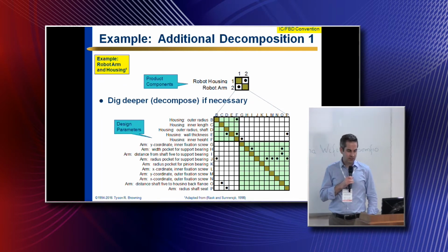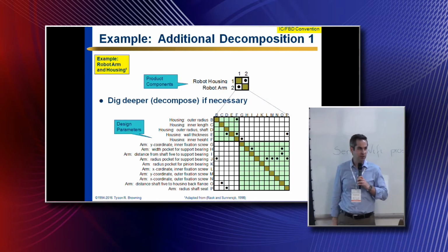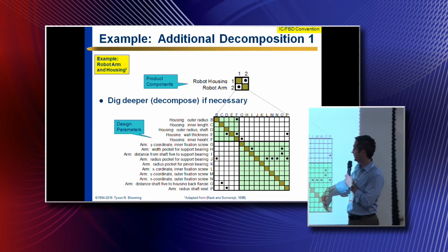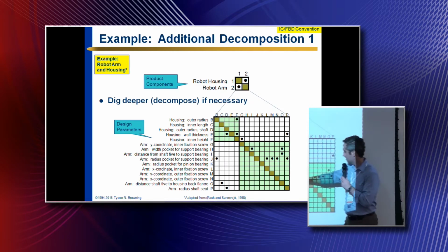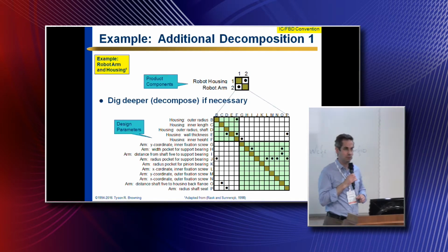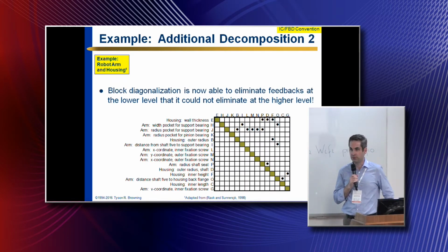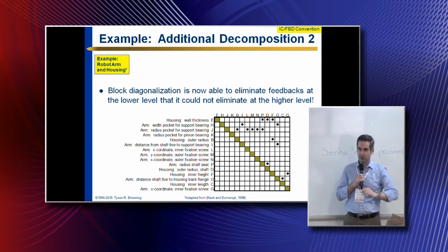So, an example of solving the problem here: we've got a 2x2 DSM that's a coupled block, a chicken and egg problem. What should come first? But when we further decompose the first activity into a 5x5 and the second activity into a 10x10 DSM, and we decompose these relationships into finer grained relationships among those constituent activities, now we apply sequencing to this model and we find, hey, it's easy. There's no real coupling, no real feedback mark. The only reason it exists is because we're treating the work, the teams doing that work, as monolithic blocks, not understanding the more detailed relationships that those teams should have.